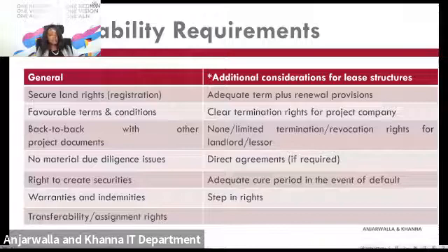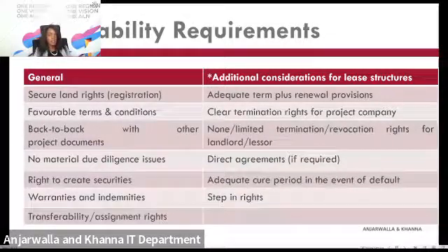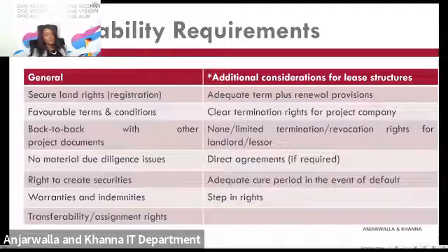Then there are also protected areas. So protected areas would mostly fall within public land, but there are certain protected areas that actually fall within private land. So certain types of protected areas would be forests, heritage sites, national parks, and areas that have cultural and historical significance. So depending on the statute under which that area is protected, there might be extra requirements before one is able to utilize that land for a project.